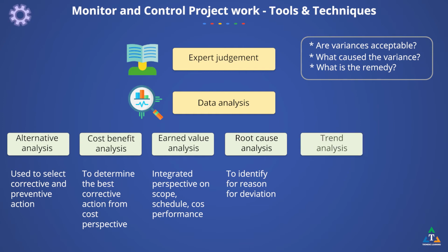Trend analysis is used to forecast future performance based on past results. It looks ahead in the project for expected slippages and warns the project manager ahead of time that there may be problems later on in the schedule if established trends persist. This information is made available early enough in the project timeline to give the project team time to analyze and correct any anomalies. The result of a trend analysis can be used to recommend preventive actions if necessary.